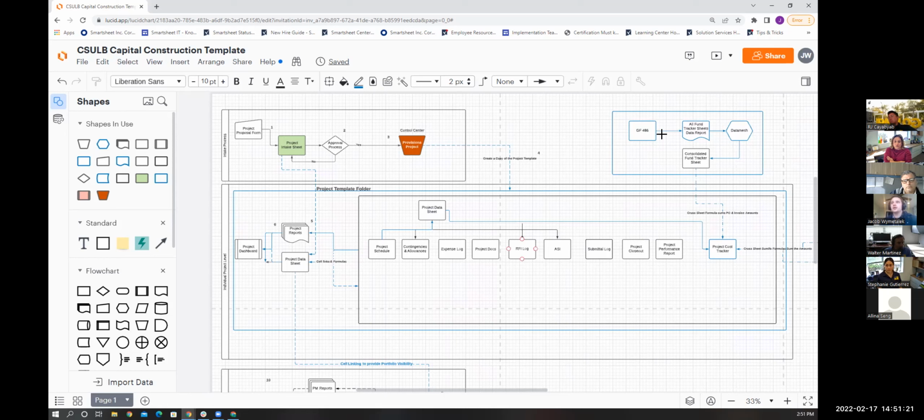Even for those that are archived? So once it's archived, it is no longer eligible for global updates. That's the one thing. But active projects will get the global update. Okay. Exactly. And so that's where there's different ways to handle the archiving of projects as well. And we'll talk about that in a subsequent meeting.